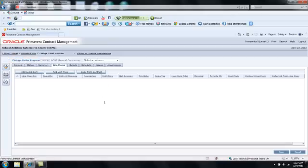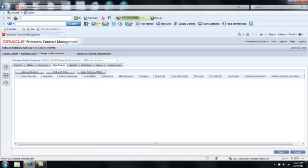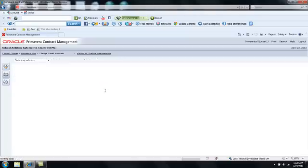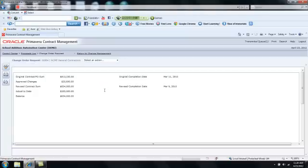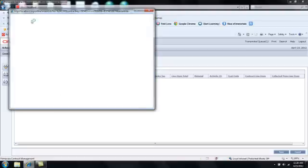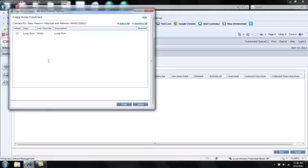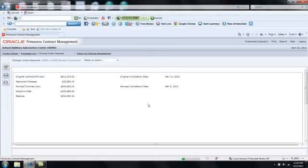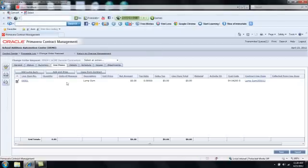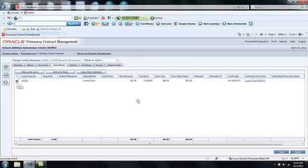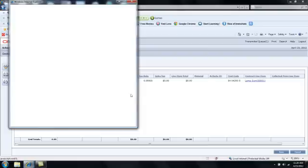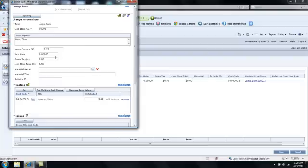I'm going to click Line Items because I need to document his quote. I can either add a lump sum line item, a unit price line item, or I can retrieve line items from the contract. So I'm going to select Copy from the contract. I'll then see a list of line items on the contract, and I can select the ones that I want to include in this change process. Once I've either selected from the contract or added a new line item, I then need to document the price. I'm going to click on the notepad. That will bring up that line item's details, and in the lump sum amount I'm just going to type $4,500 as the quote.